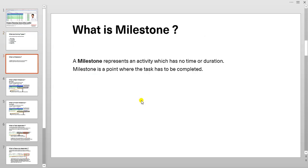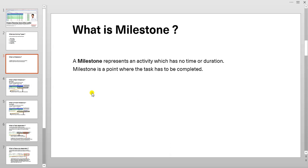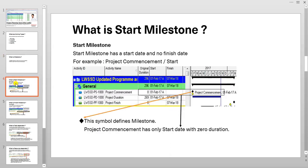What is milestone? A milestone represents an activity which has no time or duration. Milestone is a point where the task has to be completed. For example, a kickoff meeting, design completion, procurement completion. In any schedule or program or project, there are minimum two milestones. First one is a start milestone and the second one is a finish milestone.